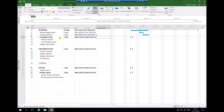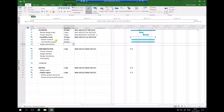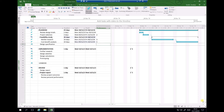A big chunk of our work is the feasibility study. We can specify the duration of each subtask: two weeks (ten days) for market research and ten days for cost benefit analysis. The duration of the feasibility study updates to accommodate those activities. However, market research can't start until project selection is complete, so the predecessor to market research (task five) is project selection (task three). The cost benefit analysis occurs after market research, so task six begins once task five is completed, and this is reflected on our Gantt chart.